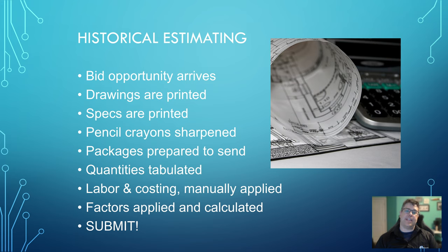And then you can start to get into counting things. If you're on the pen and paper methodology, that's going to be tick sheets or something similar. You get your clicker out, you get your Scalex out, and you start to go to town on the drawings and start to literally just count, highlight, mark things up. And that is incredibly time consuming, to simply count things. And then once you're done all of those counts, you have to tabulate that and put it together and extend it. And this is another massive time consumer.